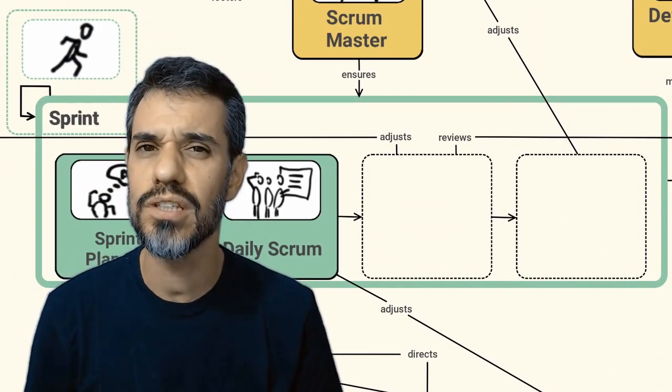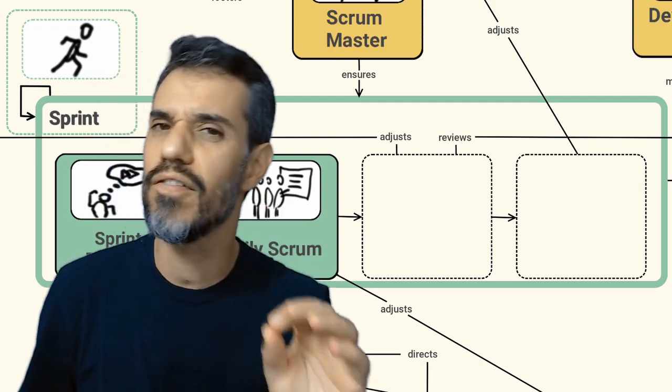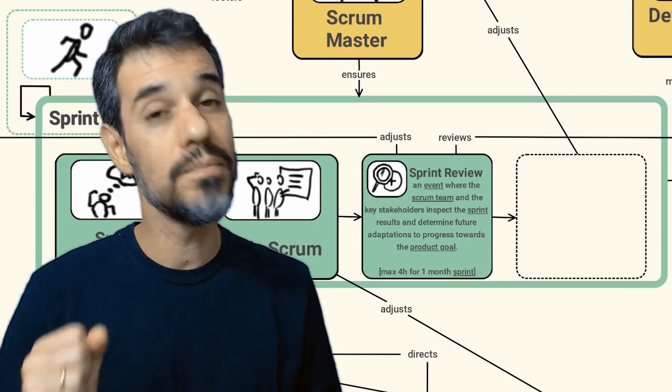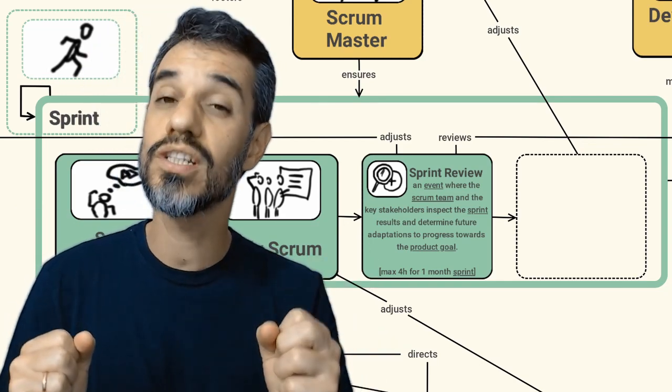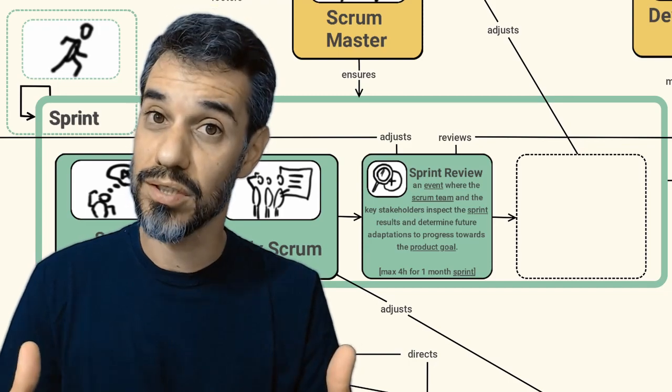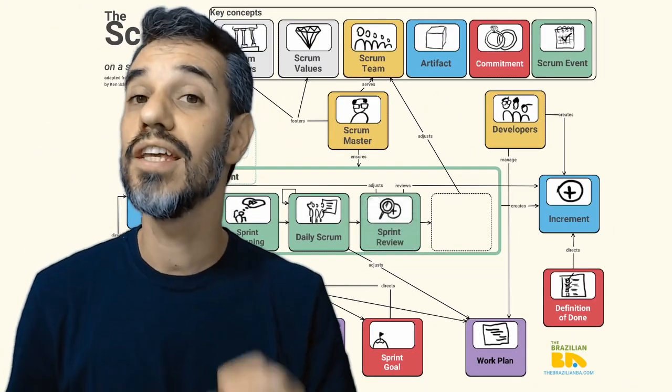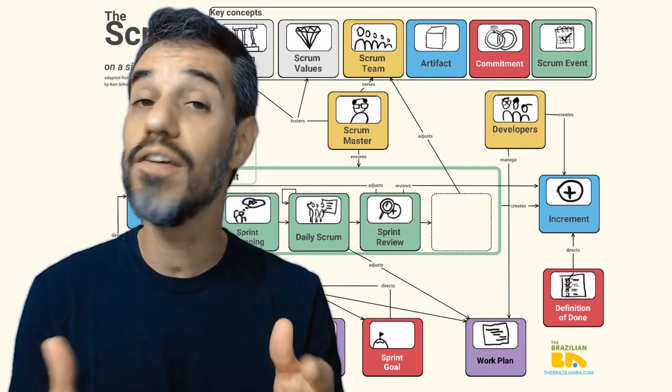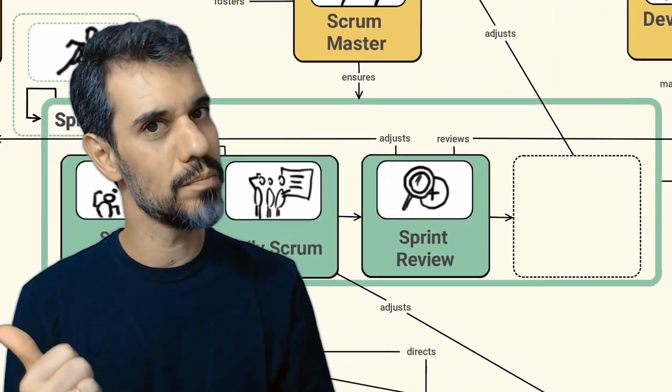At the end of our sprint there are two different events that's going to happen. The first of them is the sprint review, where the Scrum team calls some key stakeholders and presents the increment of the product. They can do an inspection in the sprint outcomes or the sprint results and make some adjustments if necessary to the product backlog.